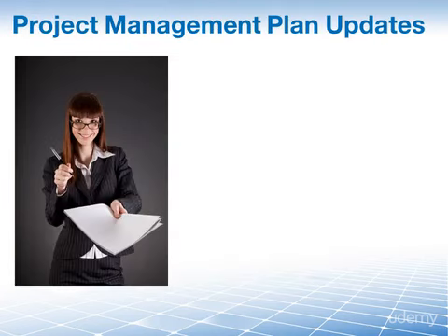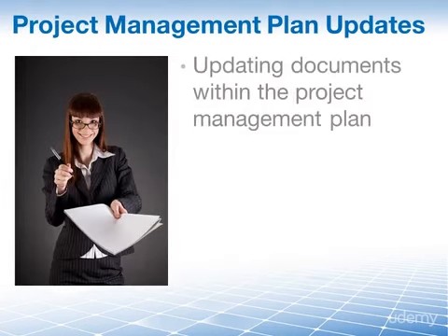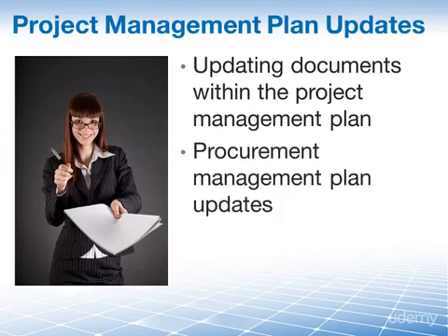And when we talk about any updates to the project management plan, we usually don't update the project management plan itself, but we think about updating subsidiary documents that are inside of our project management plan. In particular, here we may be updating the procurement management plan through change requests, obviously, in case we notice that some of the processes of how we manage our procurements aren't quite working out the way we had expected them to.